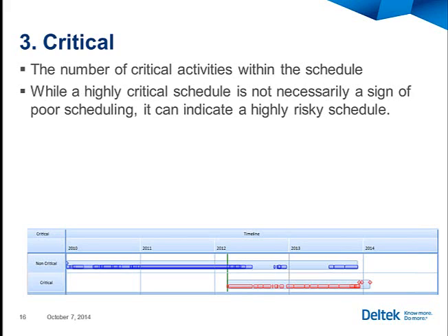This is something we look for in those successful projects, is what percentage of the plan was on the critical path. We get nervous when the whole plan appears to be on the critical path and we see a schedule that's likely not to be achieved on time. Therefore, it's an important thing to measure both at baseline and while you're executing the plan.